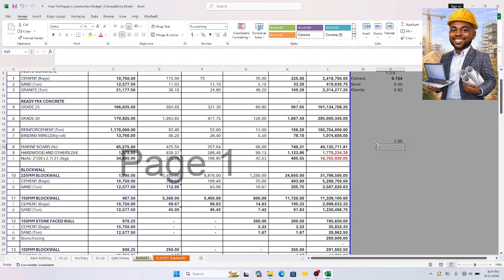So whatever I have, if I have 500 square meter, if I want to know how many I will need, it is 500 divided by 2.88. Right? How many times? By 3. So if you see what that's all I have here, this is it here, 2.88 divided by 3. This is 257.